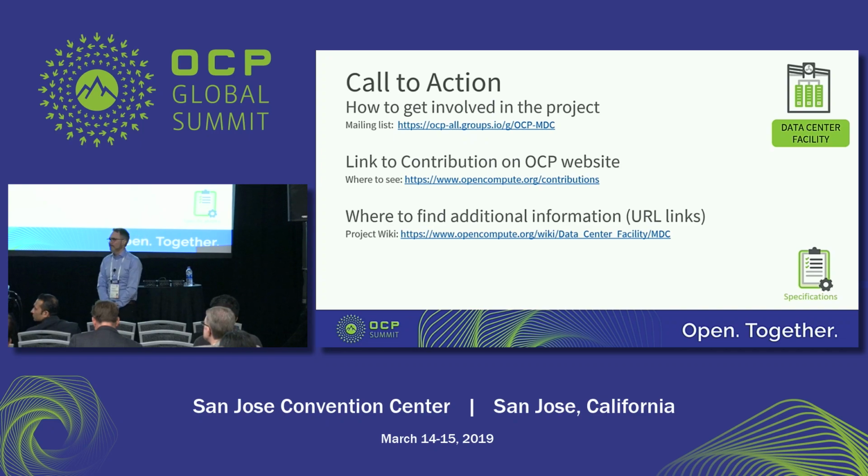Yeah. So to that point, during the project we did have a discussion. If you look at OCP racks, they're typically pre-configured at an integrator and then shipped to the site fully loaded. We were like, well, what's the chance that we just drop the module off at the integrator, they integrate all the racks there, and then you ship it to the site? Scott already mentioned some of the challenges there. In addition, some of the integrators aren't really set up with all their test rigs and everything inside their facility to test fully configured racks. So to move that into a module is a little bit difficult. So the modules were definitely designed with the idea that they might be empty. A fully configured rack would show up on site, and it can be rolled into place in the module, kind of like a traditional data center. So good question, because it was a discussion that we had during the project.